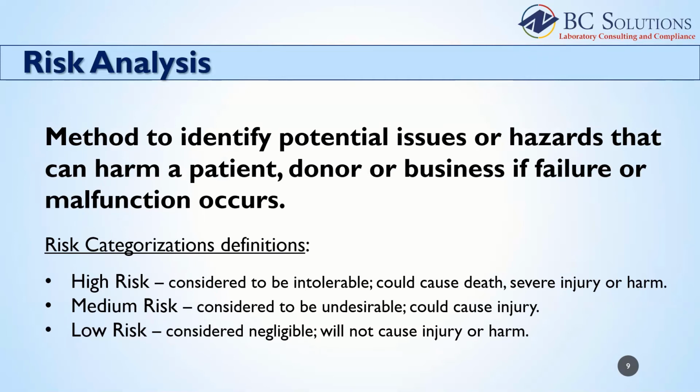The next element, risk analysis, will be a critical part of your computer system validation. Risk analysis is a method to identify potential issues or hazards that can harm a patient, donor, or business if failure or malfunction occurs. Risk analysis is interrelated with your requirements and with your entire validation plan. It would take many resources and an almost infinite timeline to validate every field and function in a modern-day computer